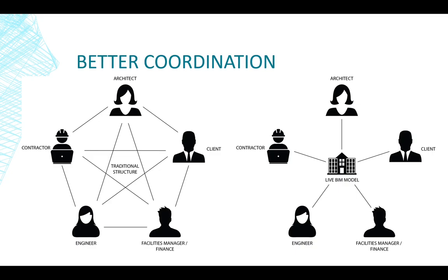The structural engineer would make some changes. That would go to me as an AutoCAD technician. I'd draw up those changes on the plans, issue those drawings, they get signed off by my manager, and then they'd actually have to be faxed or posted back out to the contractor, or a lot of the time I was told to get in my car and drive back out to the site with the printed drawings to show the contractor on site. And occasionally what would happen is we'd get those drawings to the site and the architect would come back and say he's actually not happy, so we'd have to do the process again. And sometimes you're going a bit back and forth.